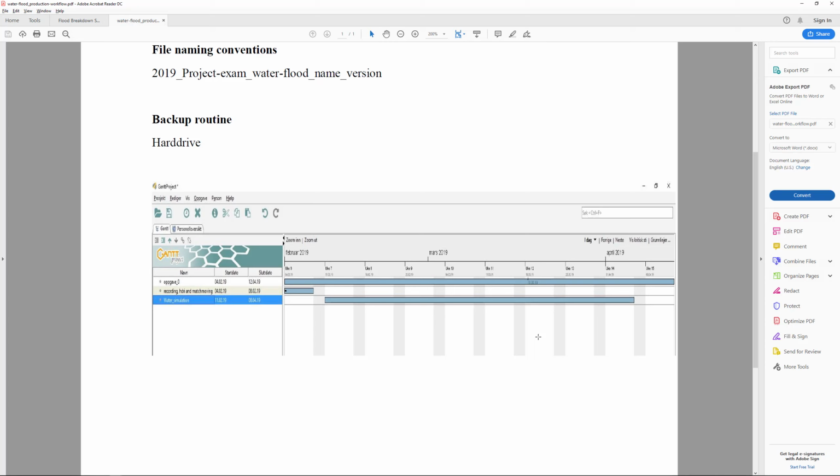Imagine you have a film and you need to plan how you're going to actually deliver this water sim. If this was a shot in a film, you can't just say, I'm going to work on it for 2 months. You do need to say, well, I'll have version 1 ready over here. Then we'll do a little test comp over here, and so you'll see at least the idea in week 1. And then we'll refine that and we'll update the textures.